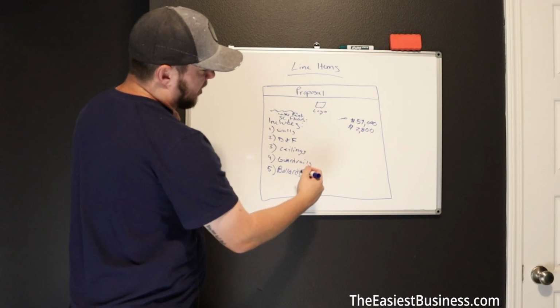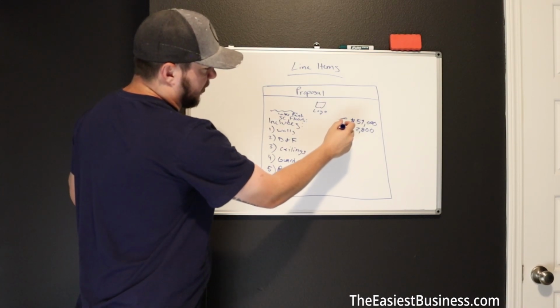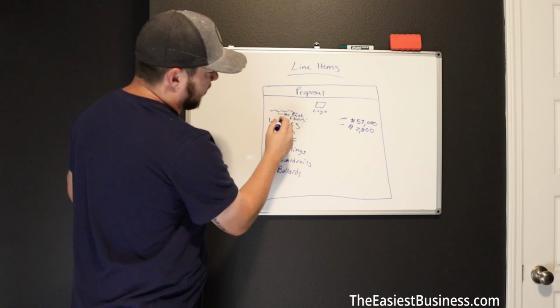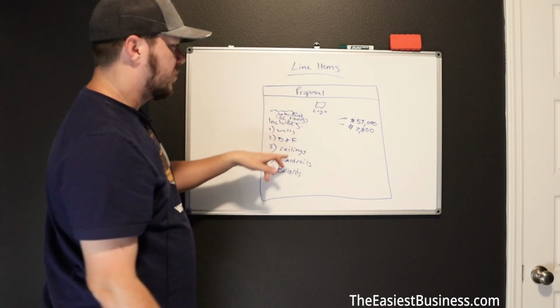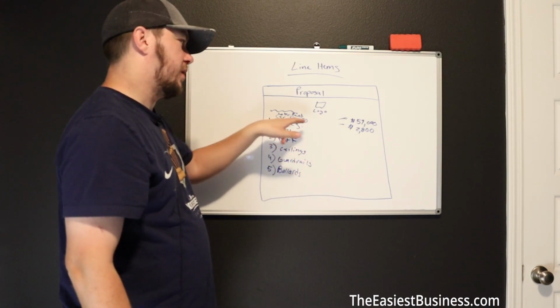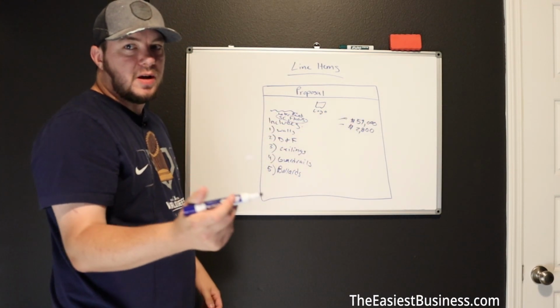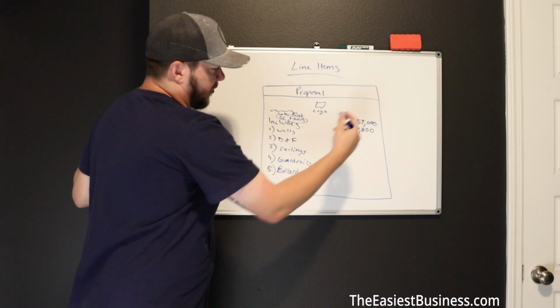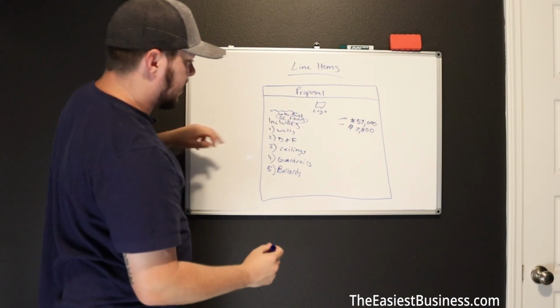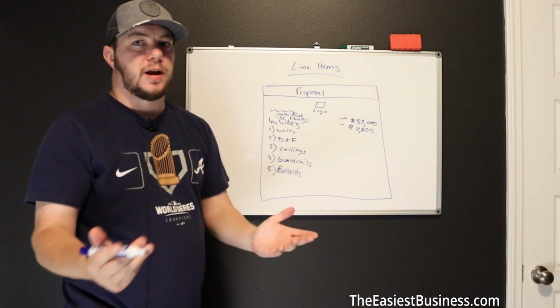Because there's no need to include it down here for this number, because you already included what that is here: sealed concrete floors. So they know that's 2,800. Your interior paint number, your total paint number, 59,000. And sometimes I would even go as far as breaking out interior paint, give them a number, exterior paint. But then I would list every scope item on both the interior and the exterior.